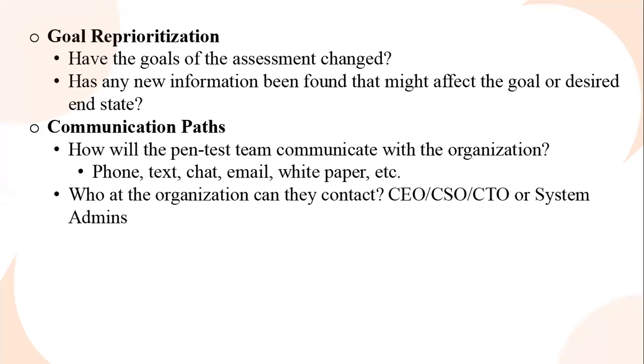So if you see new stuff, you need to say, I have seen this new stuff. Do you want us to proceed with it? Or should we just leave it out of what we're doing? We could come back for it later on. Or should we add it in? If we need to add it in, we need to re-examine, we need to re-quote, and we need to have a new price for this new task. So you need to understand that.